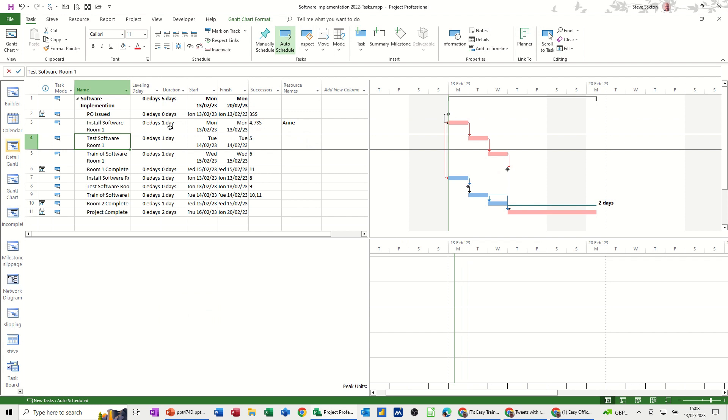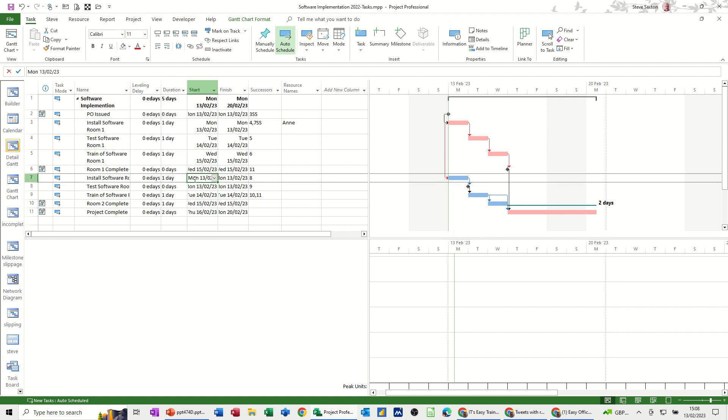But if I apply her to another task which is going on at the same time so let's just have a look at this one so we've got Monday the 13th and then we've got this task here Monday the 13th again so if I put her on there she should go red.